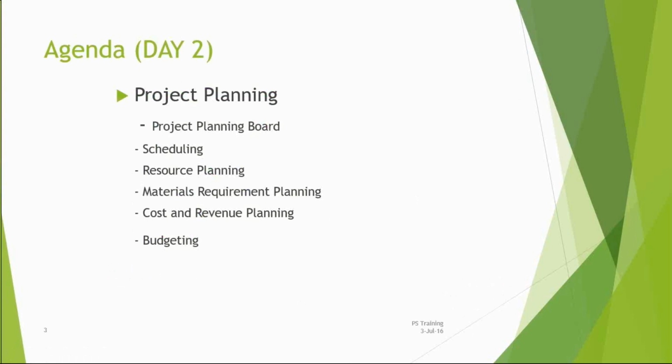And we have the tolerances. Once we exceed the budgets, if we have tolerance activated in my system, then the system will not allow you to perform any further task. It will not allow you to post any more tasks on this WBS. It will stop you.